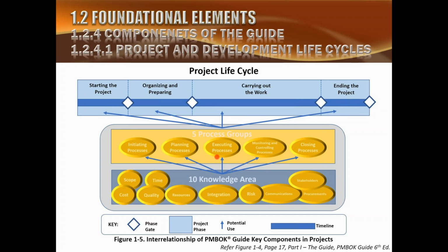and some things are being closed and some things are being initiated. And you see, in the life cycle of this project, initiation is happening for every phase. So initiation is here, here, here, here. At the start of every phase, there is initiation. At the end of every phase, there is closing. So you see, it is again repetitive in nature. So all the 5 process groups will be applied to the project life cycle, as well as all the 10 knowledge areas. The expertise knowledge about each one of these knowledge areas will also apply to your project.